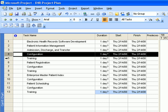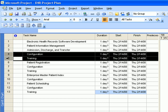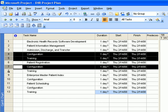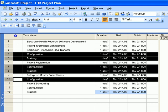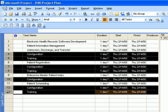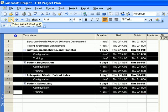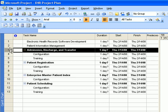Hold down the Control key and click on Training, then continue holding Control and click on Configuration and Training for the remaining tasks. After highlighting them, click on the Indent icon.